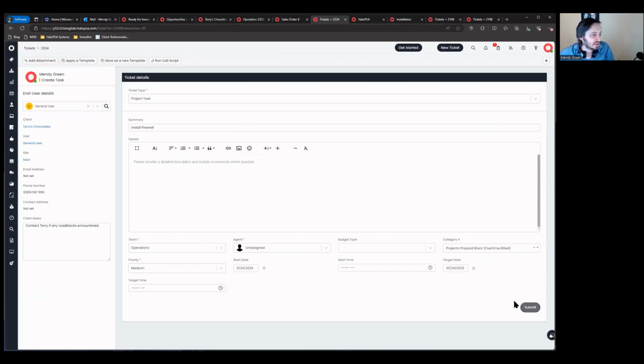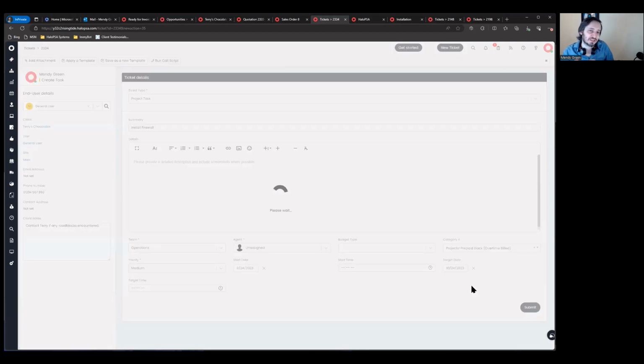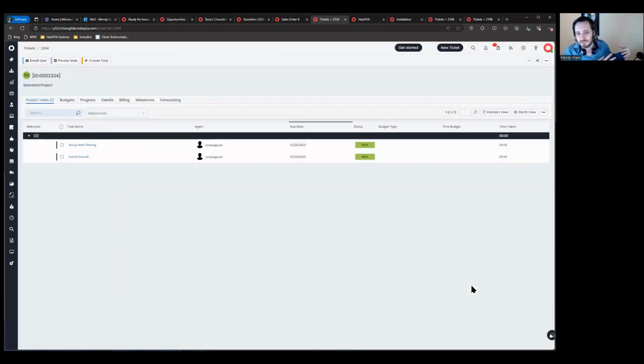Okay. Now, remember I mentioned, I kind of broke out this project. I'm like, well, we know it's 2 hours to install a firewall and we know it's 3 hours to install a firewall. And we know we're going to give 2 hours for the web filter setup, but we may go over. So you can literally take that breakdown if you have it and actually put each project task onto a different type of billing type, right? So you can say your task to install a firewall, that's capped. We know that's a 2 hour thing. And so we're going to mark that as don't invoice or prepaid or whatever, the fixed fee as part of the project.